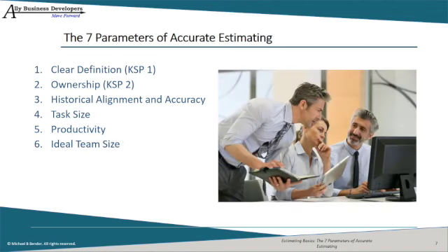Every activity has an ideal team size. Many tasks have an ideal team size of 1. If you're familiar with extreme programming, you'll profess an ideal team size for creating code is 2 programmers. If you've ever had somebody finish a basement or build a deck, you'll likely recognize an ideal team size of about 3 or 4, depending on capabilities. Less than 3 causes the team to lose efficiency, while more than 4, they're starting to trip over themselves.